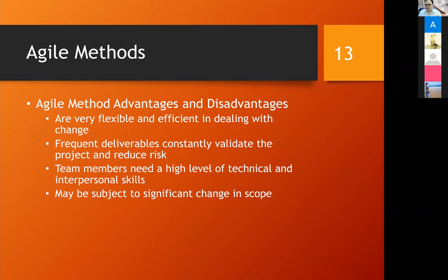This one you have to know, because as I told you, we separate one team as the technical part together with the management, and another team works on the functional part. The team with management and technical might change the scope of the project. One thing you have to know is, if the scope is changed, what will happen? If the project scope is changed, for sure, time will be changed. Second, money. The budget that you have to prepare, if the scope is increasing, you have to pay a lot more.